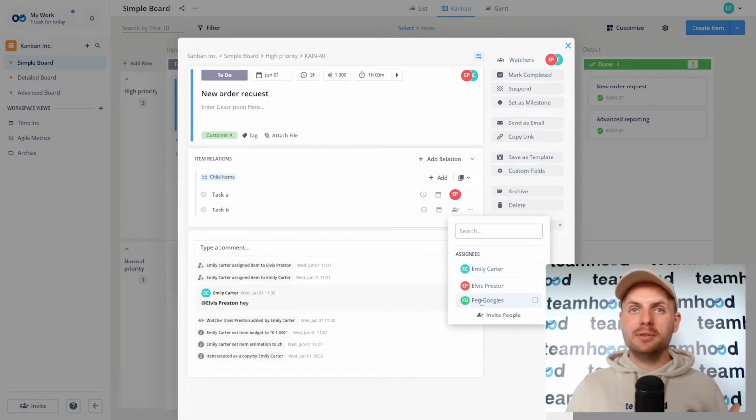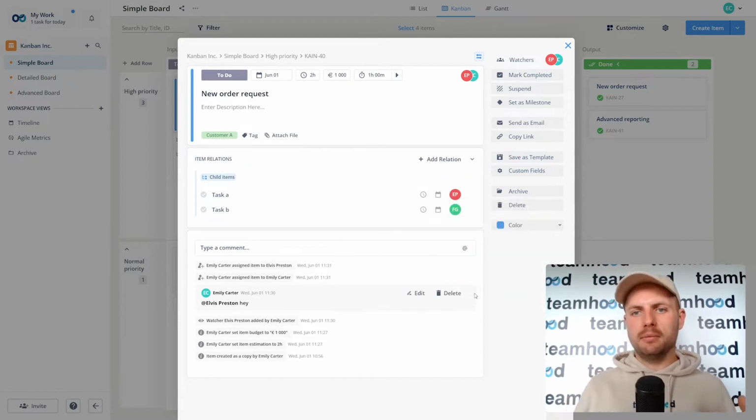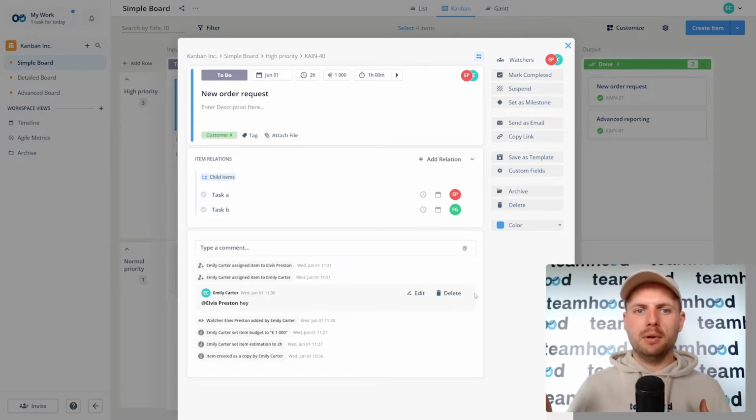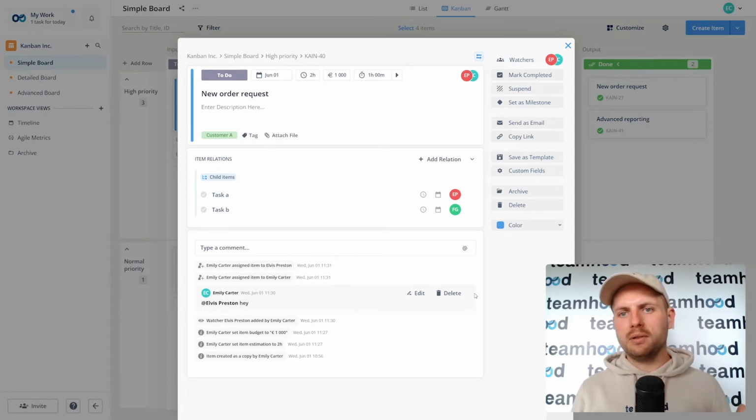It's extremely useful when you're working with a larger team or with larger work items, because you still need to deliver specific things one thing at a time. Don't create large and long time-taking tasks. Just break them down into smaller ones. It will be far more superior in terms of progress tracking and people just knowing what needs to be done.